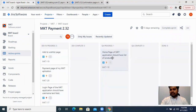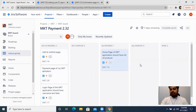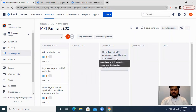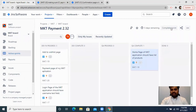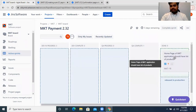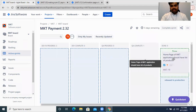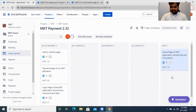Now my QA will start testing it, so they will move this task to 'QA In Progress.' Let's say the tester raises a bug — that bug will go back to the 'Dev In Progress' state, because the bug has to be fixed before the task can proceed. Once the fix is done, the task moves to 'QA Complete,' meaning testing is done for that particular task, and then it moves to 'Done.'